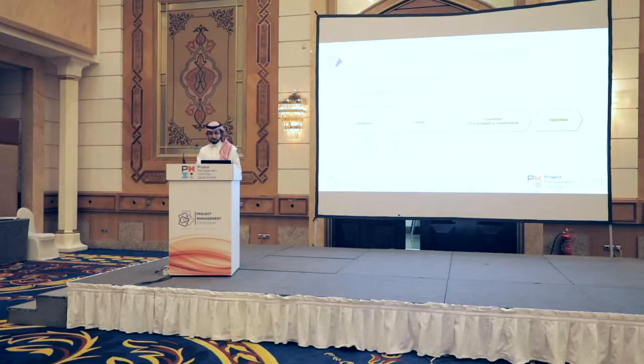So currently we are at 10% construction progress for this package, and the contractor is utilizing the model to identify and resolve the clashes, generate shop drawings, and update the model with the as-built information as the activities proceed. Here is another example of the clash detection simulation during the execution phase.